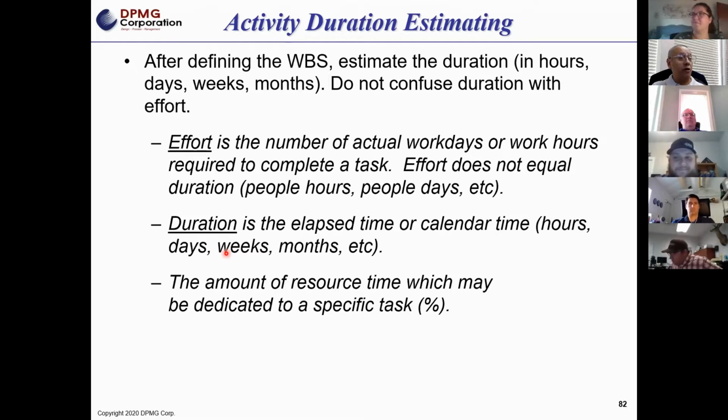Officially there are 4 quarters, 15 minutes per quarter, 4 quarters, 60 minutes of play. The duration of a football game is like 3+ hours. They're officially only playing 60 minutes, but because of all the stoppages and substitutions and commercials, a 60-minute game turns into 3+ hours. That's the difference between effort and duration.